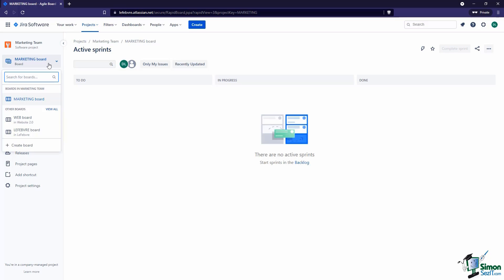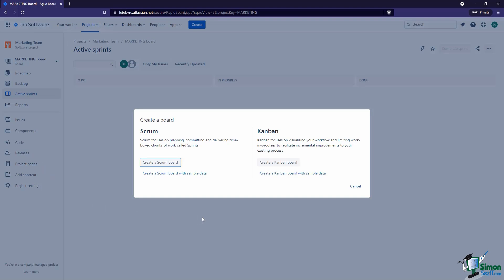Come over here to the board dropdown, click on 'Create Board.' The key thing I want to point out is we can create a scrum board by clicking this button, and we'll do that in a second. But I also want to point out we can create a Kanban board even though we used the scrum project template. The template is really just how things are set up initially — from there we can customize however we want. And vice versa: if we created a project with a Kanban template, we could create a scrum board in there as well.